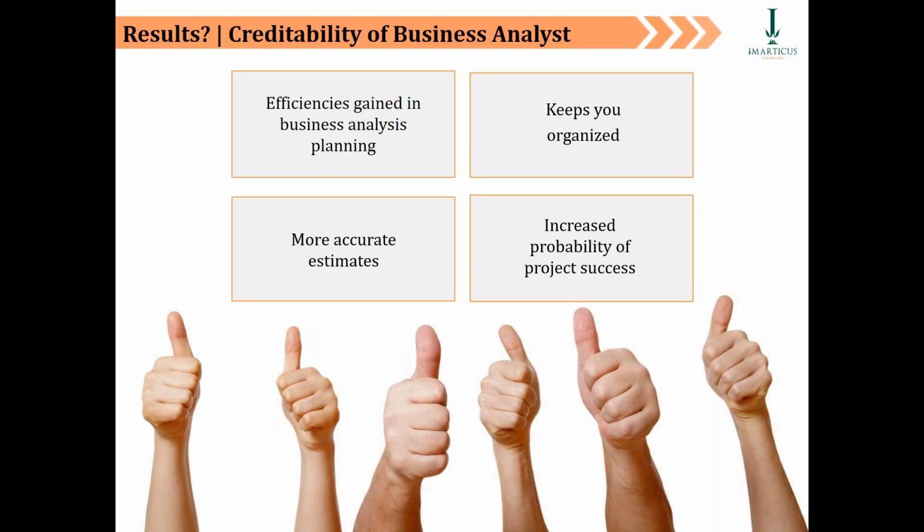I guess it's pretty simple, right? If you do a planning exercise and then go along with it, the efficiencies gained are probably more than if you hadn't planned. An important side of planning in BA exercises, guys, is that when you plan things, you are also able to estimate the effort. So you know that with such and such a set of stakeholders, a complex requirement will take this much time to generate, and medium requirements will need this much time, because all that goes back into the timeline chart. Hence these are very important for you to give to your project manager.